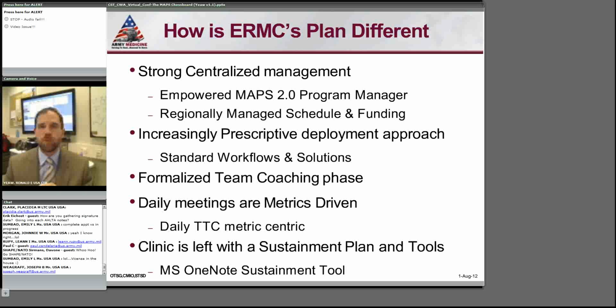We also lead in with metrics. I do a metric review twice a day. Metrics aren't just going to happen. You've got to drive them. You saw earlier, I have a very unique take on time to close. Your historical time to close is 24 hours, 48 hours, 72 hours. My time to close is 4 p.m.